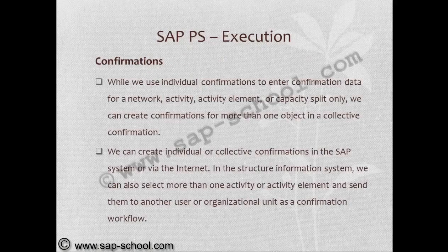While we use individual confirmations to enter confirmation data for a network activity, activity element or capacity split only, we can create confirmations for more than one object in a collective confirmation. We can create individual or collective confirmations in the SAP system or via the internet. In the structure information system, we can also select more than one activity or activity element and send them to another user or organizational unit as a confirmation workflow.